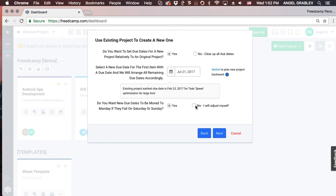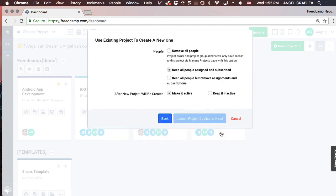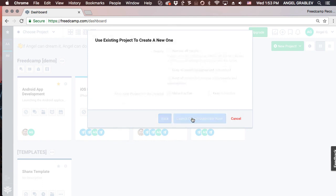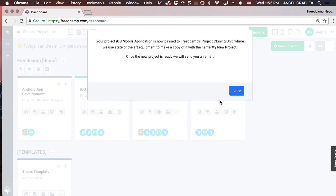We will automatically move due dates that fall on a weekend to the following Monday. Now you will have a choice to keep everyone in the project and have their items assigned to them, or remove assignments. Once the duplication is complete, you can keep the new project archived until you are ready to start. Launch the project duplicator and wait for an email from us.